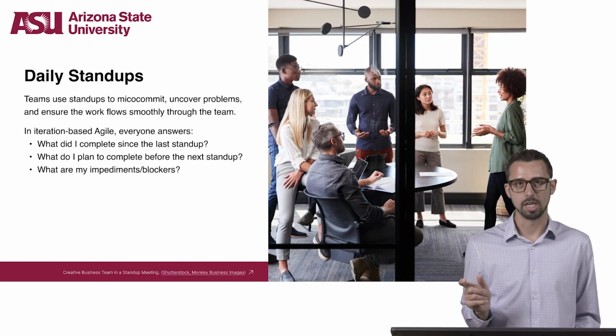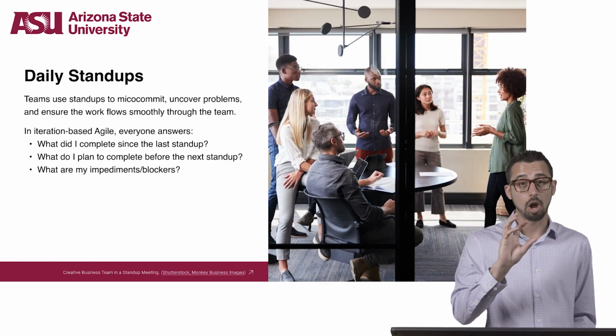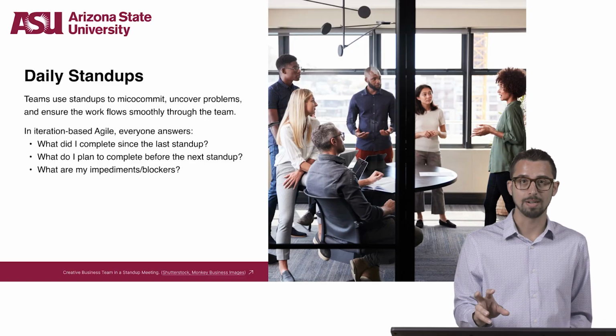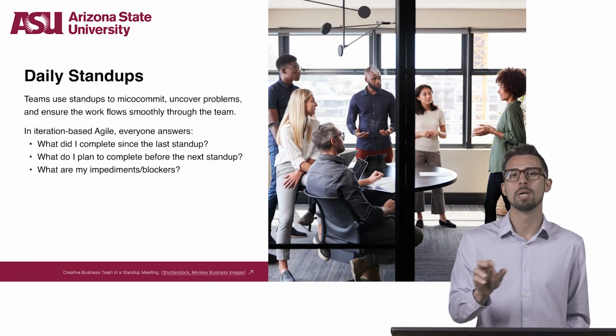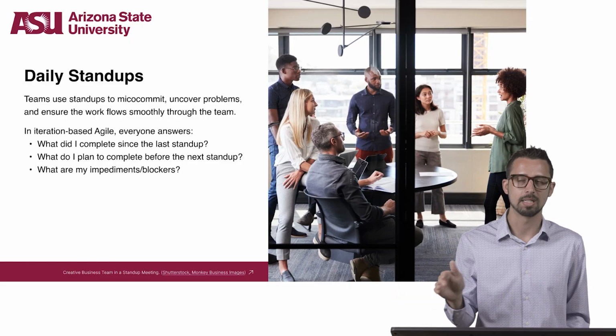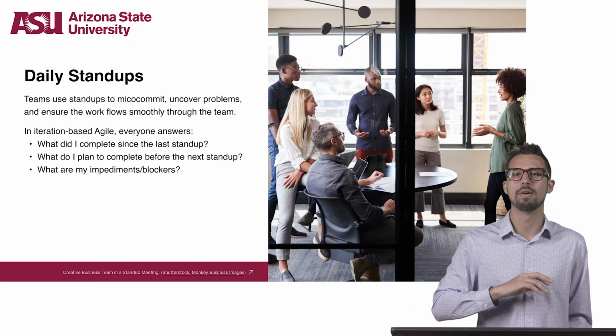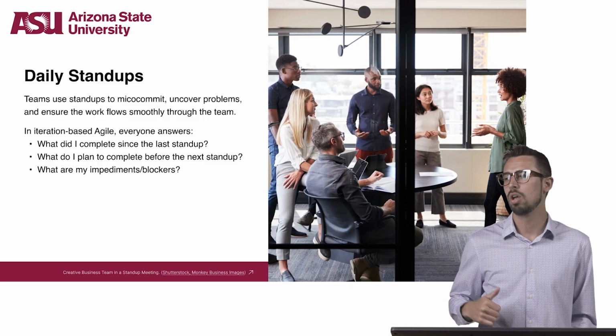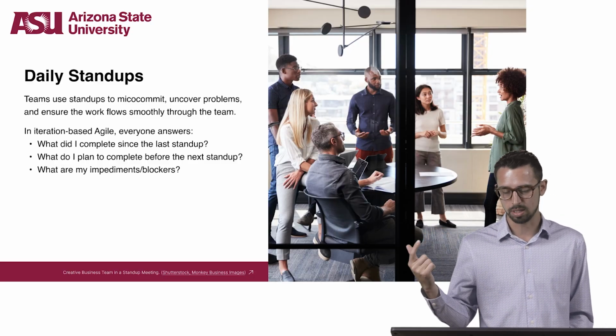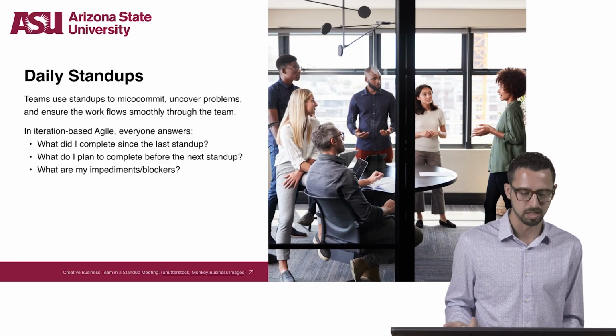Something important to do here. One, always hold stand-ups. Stand-ups are a really good process, but time box the stand-up. Hopefully no longer than 15 minutes. If you need a stand-up that is longer than 15 minutes, I would argue either your team is too large or someone or several people on that team do not understand what a stand-up should be.